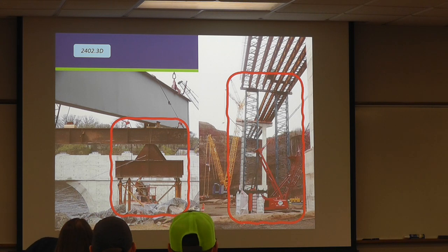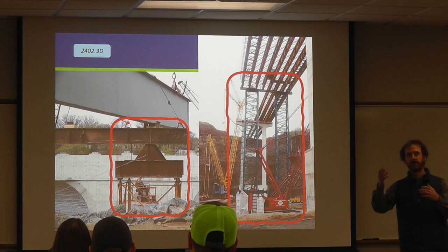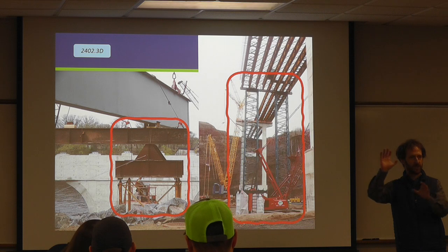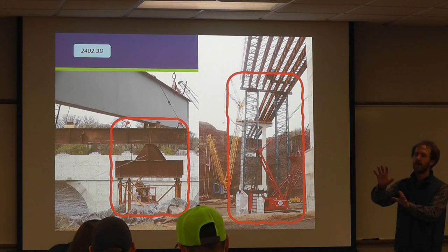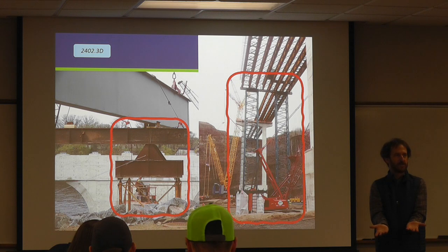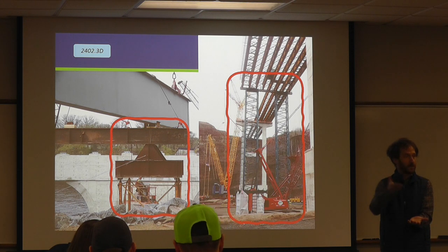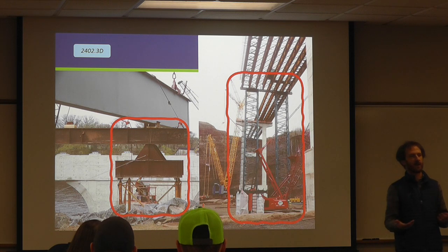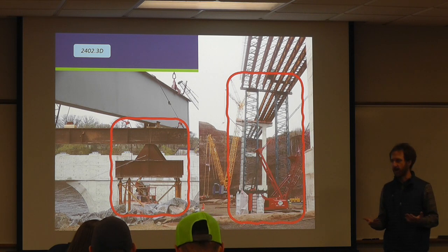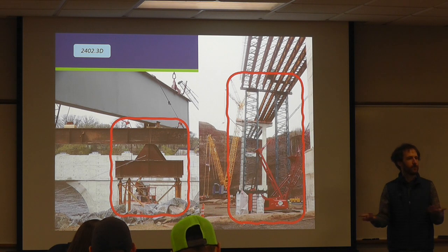So a lot of times these things will have stamps on them. You know, it'll be like a Safeway T200, right? It'll be stamped right on the tower, especially if it's a newer one that hasn't been beaten up. And so you can go to your erection plans and see that, yep, that's what's here, it matches. Sometimes you won't have those labels, and that's where you gotta start talking to your supervisor that's out there, right? Talk to the contractor and have them prove to you, right? Especially if you're suspecting something's wrong.